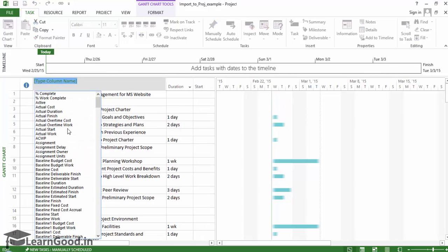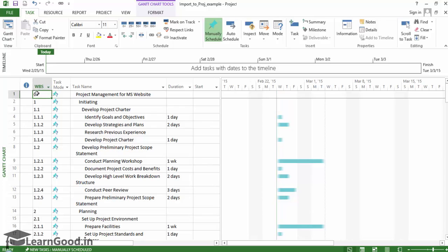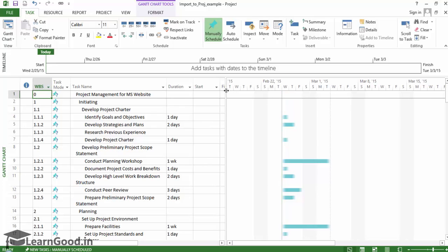I right-click and click Insert Column on the Context Menu. Then I select WBS Column. And there, we have it finally.